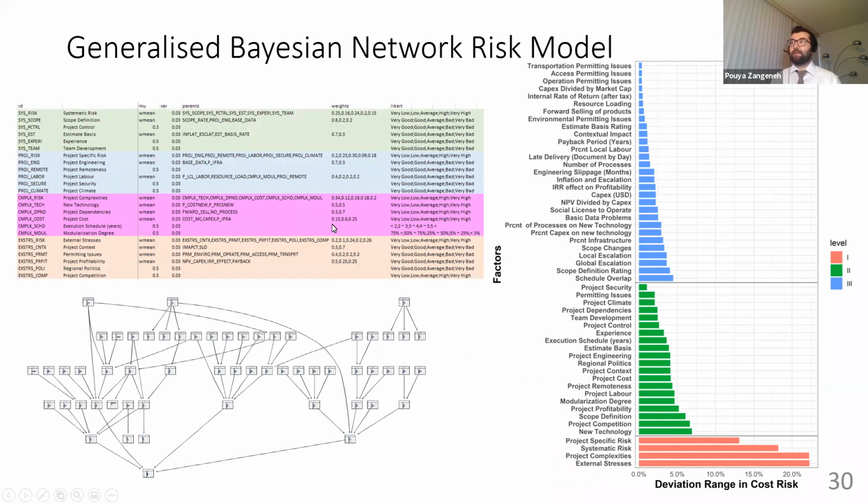I should say, in training this model as well, there have been a couple of those rounds of interviews that I mentioned, which were basically used to train this model using analytical hierarchy process to establish weights for different parameters within the model.